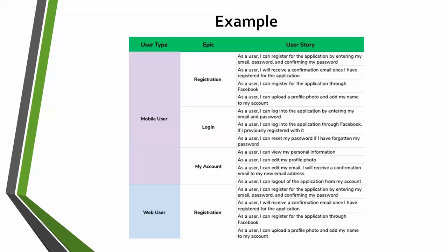Yes. In that login, there are multiple user stories. Login as a new user, login as an existing user, login as a single sign-on user, login as a third-party app user like Google, Facebook, a social media user, and there can be stories like login for a paid user, what access he can get. If it is an enterprise application, you cannot have access to all the things, right? So login is one epic, right?